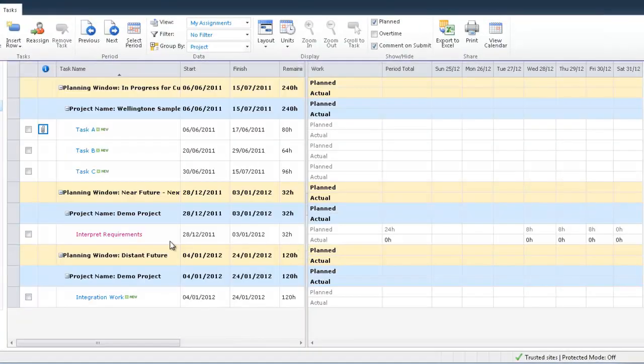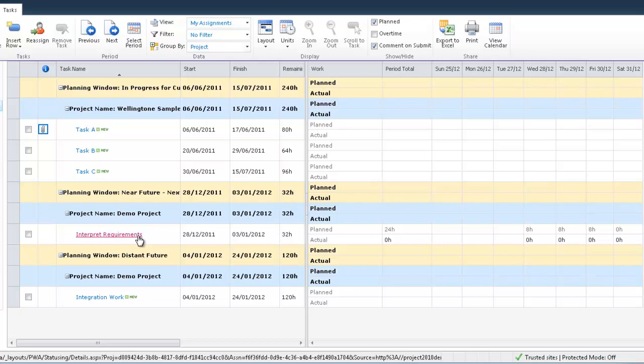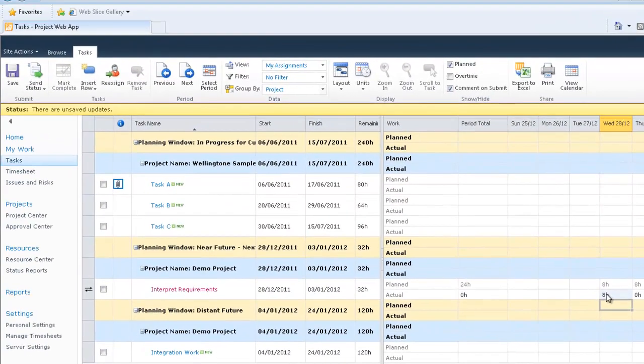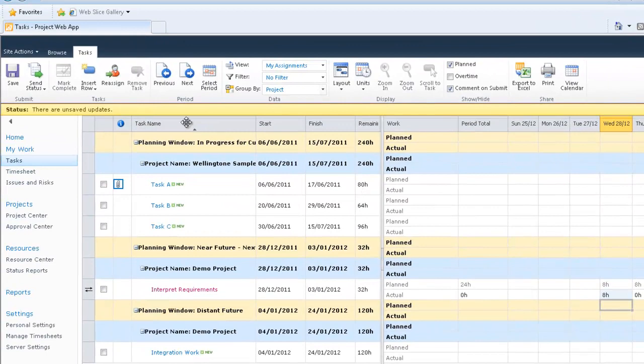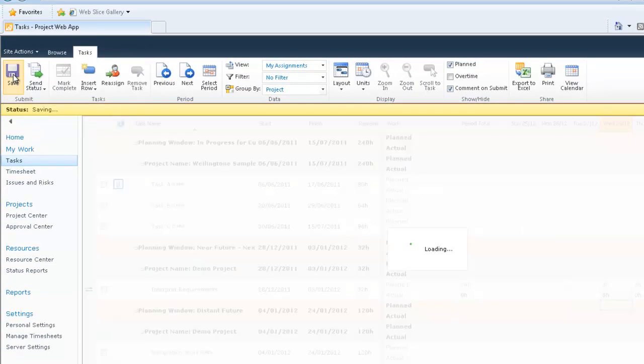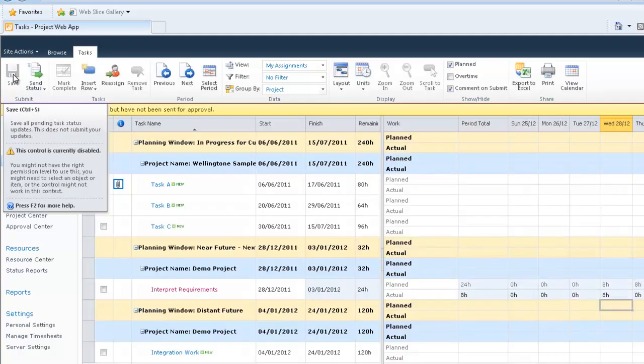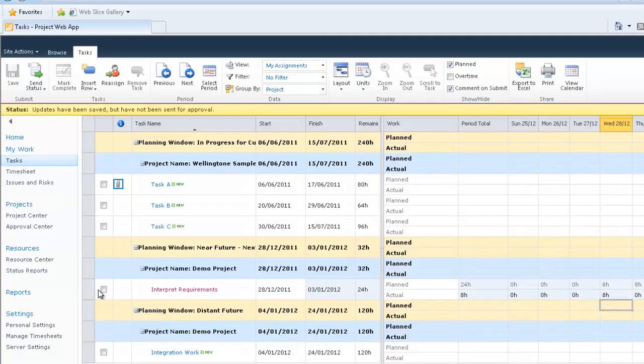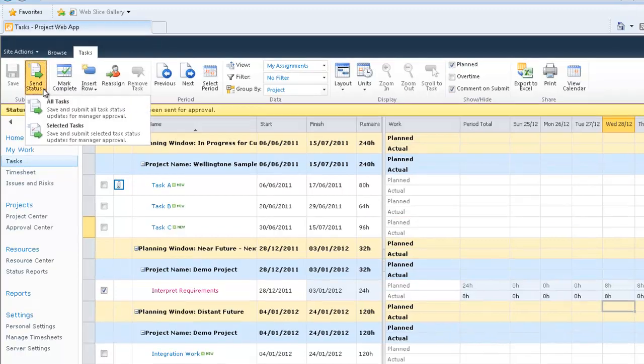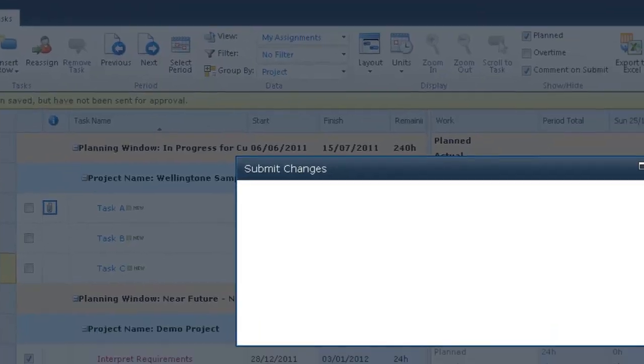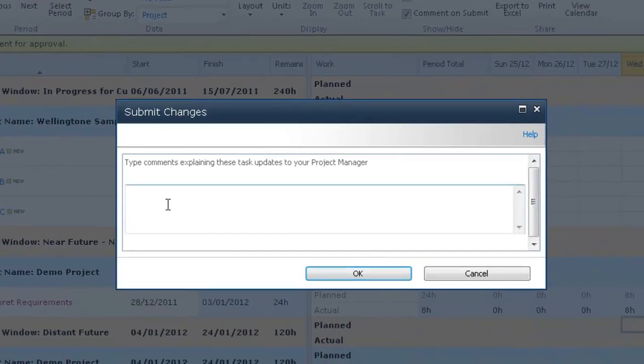Within this area here where I can see the task listed, I can also see the calendar view. What I'll do is I'll actually populate this and I'll say that that particular day, I have actually done eight hours of work. When I click away from that, I'm notified that there are unsaved updates. So if I hit save, I can then select that particular task and I can send the status update on the selected tasks back to the project manager. I can also provide a note.